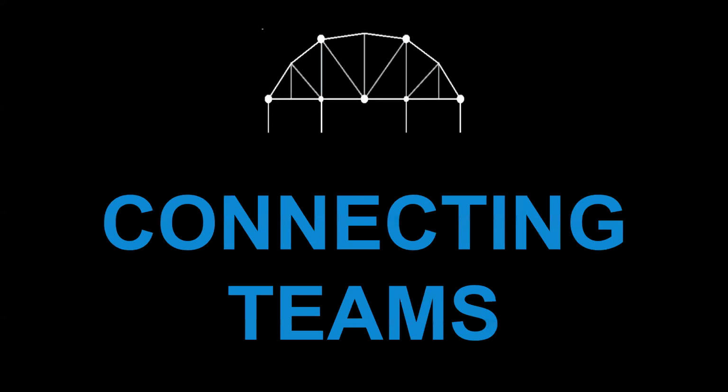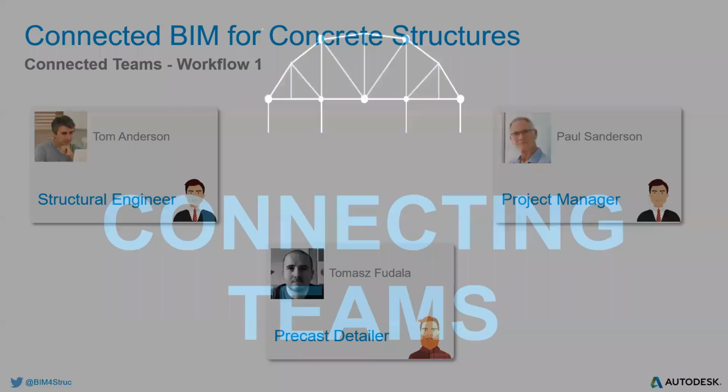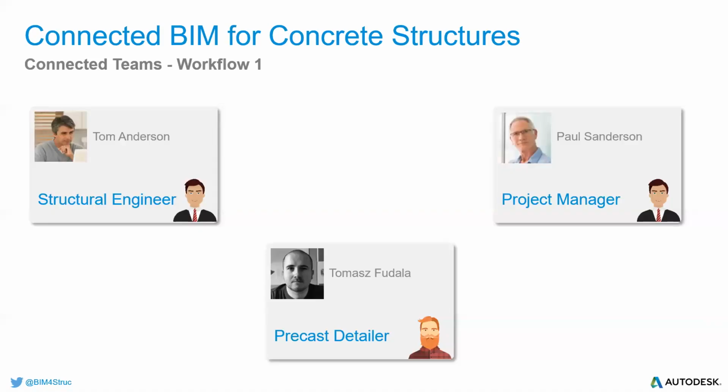So basically now we want to start collaborating with the architect just to ensure constructability, because sometimes the models that have been proposed by the structural engineer could be clashing with the various architectural elements, like maybe the windows, the doors, or sometimes can also be clashing with the MEP elements, where maybe there's a duct which is cutting through a beam somewhere. So to ensure that happens seamlessly, they need to now start working on that collaborative platform.